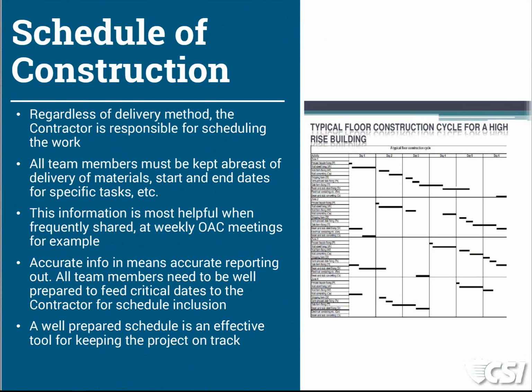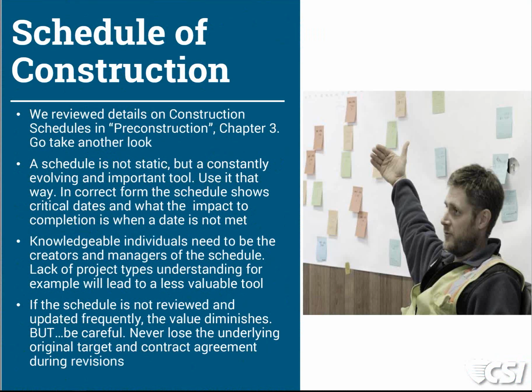But one of the things that's really important here is that these schedules be kept up to date and that they be accurate. So let's look at the next slide and we'll talk a little more. And I'll skip to the very bottom there. One of the things that we don't ever want to lose is what was the underlying schedule, or the original schedule based on our contract agreement. So I spoke about updated schedules, and that's important. As items, perhaps, let's take the high road and say, get started early and get finished early.